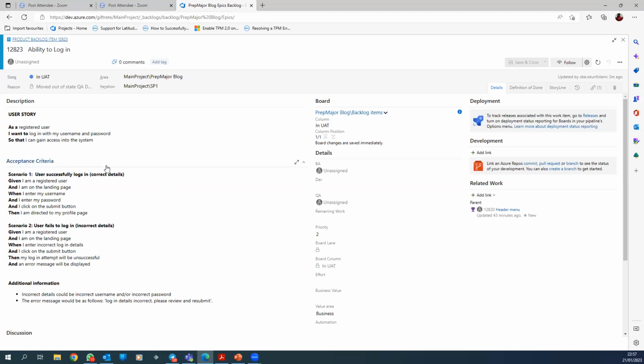Sometimes, you're already talking of payments, right? If you're writing a story for payments, you would have already said scenario 1, PayPal, maybe scenario 2. You can't even do scenarios for different payment types, because the payment stories are big stories. So they will stand on their own. You will have maybe a story for payment by Klarna, a story for payment with PayPal, a story for payment with credit card or debit card. It wouldn't even be in scenarios, because a payment story is maybe even an epic or a feature.